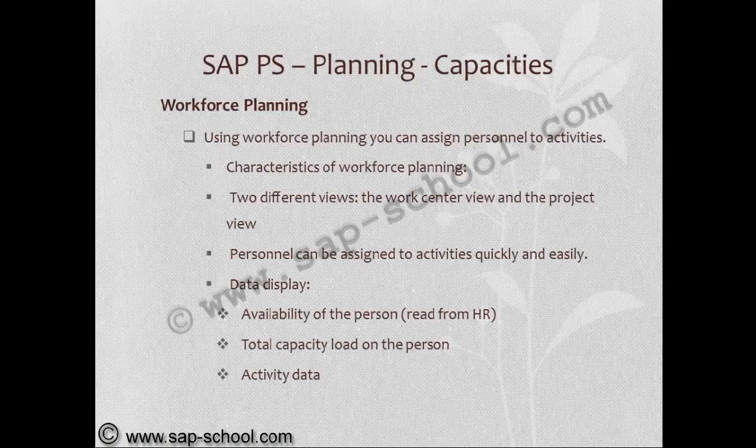Using workforce planning, we can assign personnel to activities. Characteristics of workforce planning are two different views, the work center view and the project view. Personnel can be assigned to activities quickly and easily. The data displayed will be the availability of the person. It will be read from the HR master, total capacity load on the person, and activity data.